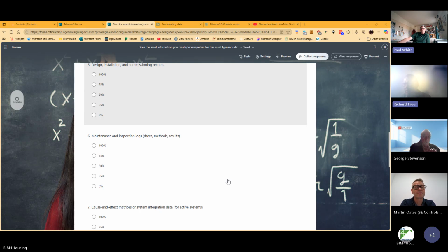And even if you are, I don't think people are using them because they don't understand why they should. So at handover, you wouldn't have a record of what's happened in previous inspections. No, because there wouldn't have been one. But there might be now, because there may be some pre-handover inspections being suggested. Right, okay. But that would be delivered as part of the commissioning report, and then hopefully would be kept on file. But as to what anybody does on site after that, that's up to them.